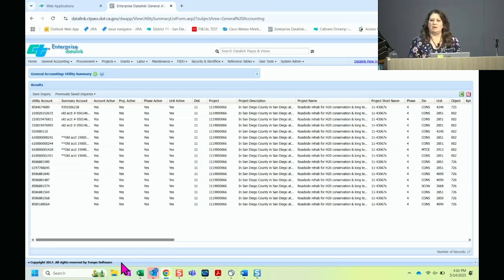And what's going to happen is all of a sudden, when we finally go to clear it, your expenditures are going to spike. You think your project is done spending, but you've got $200,000 worth of rejected utilities. And as soon as those clear, your expenditures on your project are going to go through the roof. And it's been 6 to 8 months later.